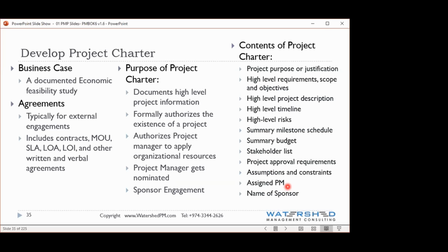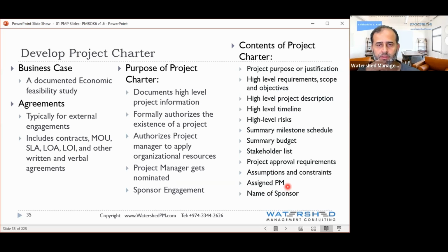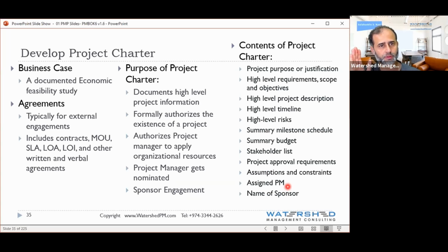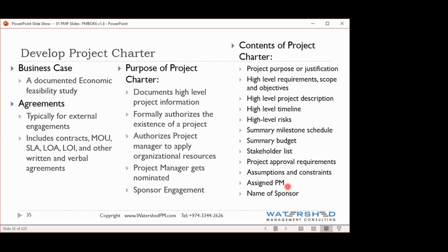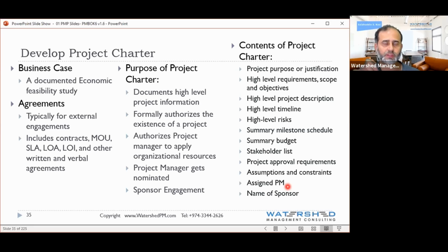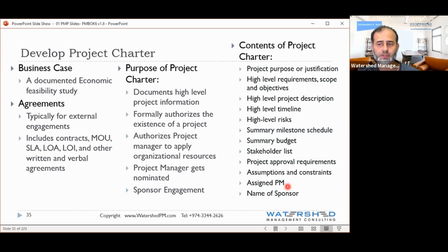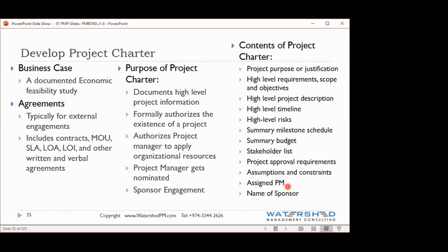Assign project managers. Okay, fine. That's done. What next? What will be in the charter? Stakeholders, you have to identify. Okay. So one of the sections in the charter is the list of key stakeholders. What is the name of another section in the charter? Budget. You'll say budget and you'll put whatever is the budget that you know. What can be another section in the charter? How much you will take for doing this project? Timing, duration. How much time you will take? Risk involved. You get the idea? Now hang on a minute.